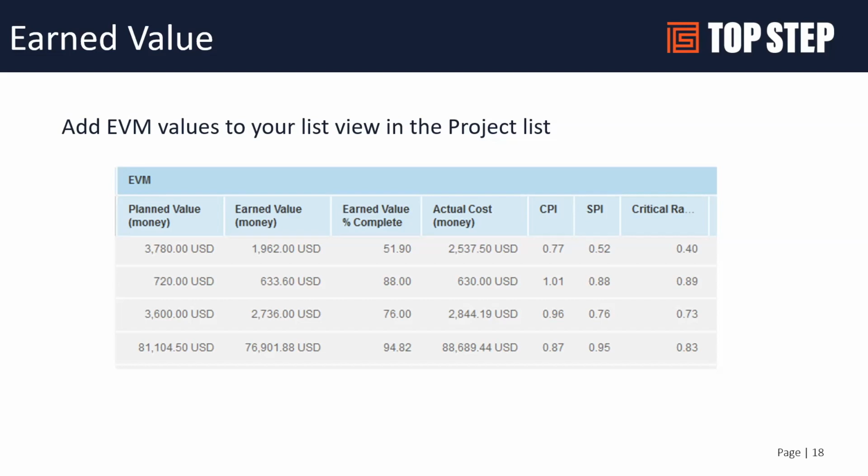And then there's another value that is pretty widely used as well, what's called the critical ratio. And a critical ratio is the CPI times the SPI. And as you can imagine, if the goal of CPI and SPI is to be 1 times 1 equals 1, so again, the critical ratio goal is for it to be as close to 1.